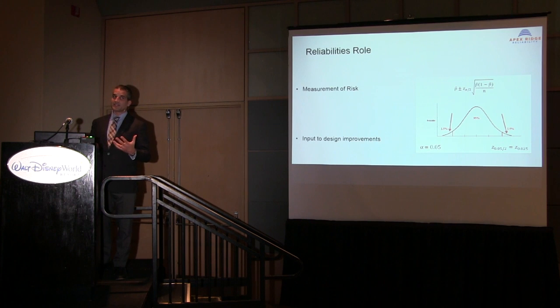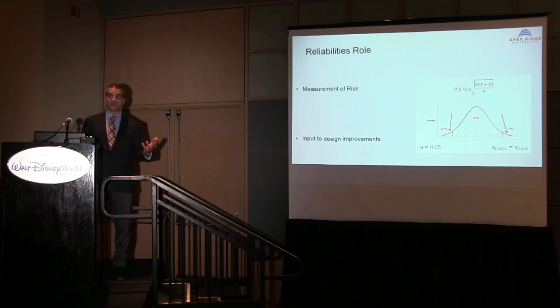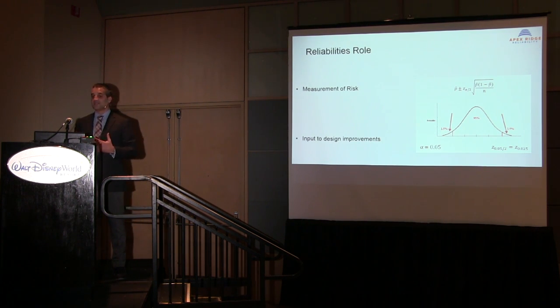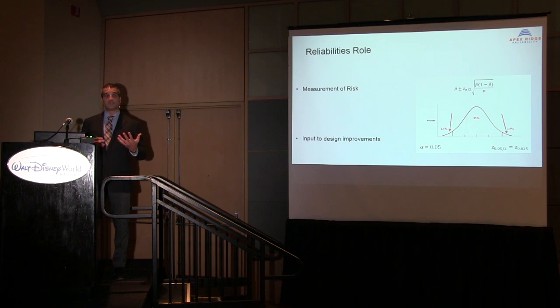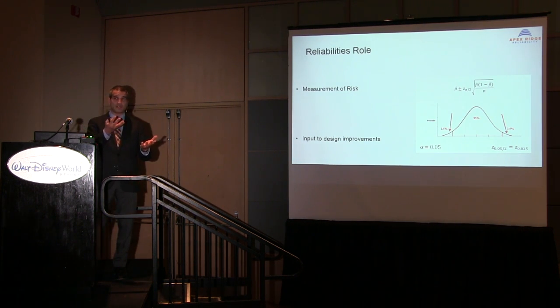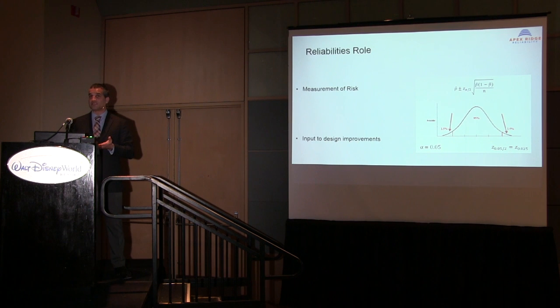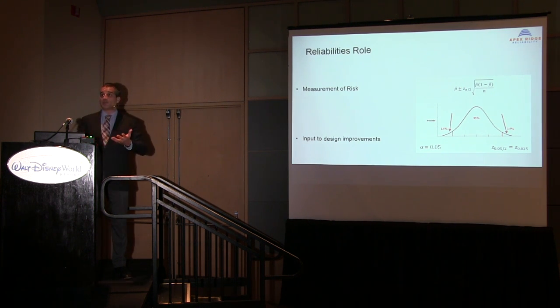So on the reliability side, our objective with reliability testing is to measure or to improve the reliability of the product, right? The tests usually take either one or the other or a blend of those as their objective. And so we're looking for statistical information, obviously. And this can be a bit open-ended. You want to put into a schedule how long a test is going to take. Well, you need to have failures for your data set. That's kind of difficult to just say, oh, a test is only going to take X long.